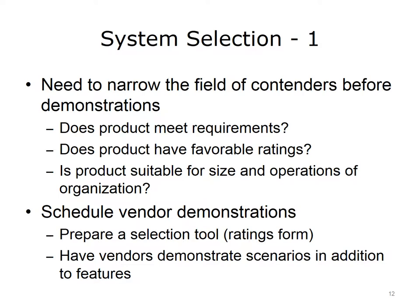By considering several questions, the field of contenders can quickly be narrowed. For instance, does a product meet all the organization's requirements? Does it have favorable ratings? Is it suitable for the size and operational scope of the organization? When a manageable number of vendors has been selected, the organization should schedule demonstrations of the selected EHR products. Before the actual demonstrations, it is prudent to develop a ratings form that can be used to compare and contrast the various features of the EHR products under consideration.